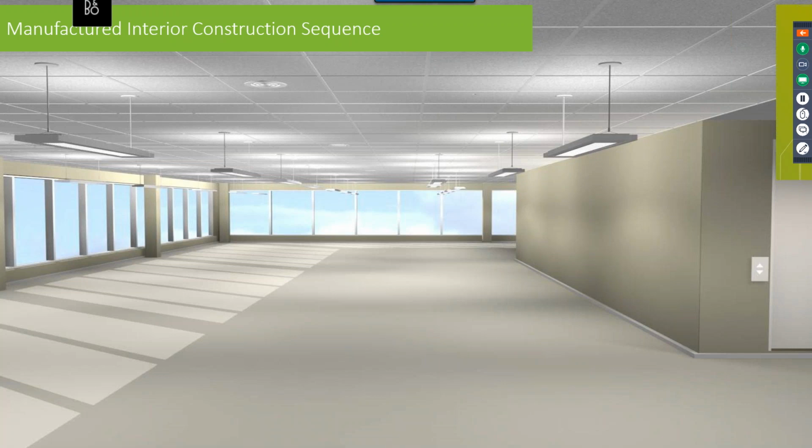And in this example, we're starting with the ceiling. So the ceiling contractor is coming in and working in an open plane. So you can imagine that while he or she might use roughly the same volume of material with this approach, they're going to move through this effort much more quickly, so your labor costs will go down. So these are the types of handshakes we need to understand, both for those who are doing any estimating, and also the subs need to understand, both to the benefit of their own schedule, but also to the benefit of the client, who should be recognizing a less expensive install effort because they're not having to move in and out of spaces and cut tiles.